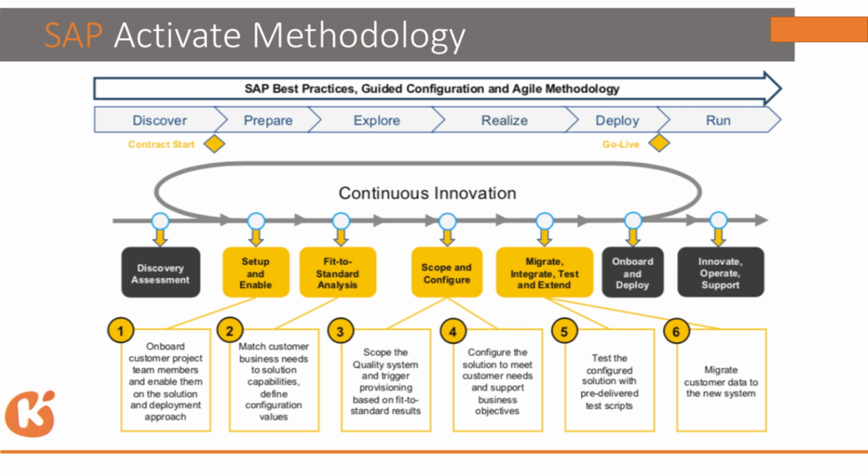The same way with drop downs, which can be anything like marital status, male or female, address type, permanent address, contact address, temporary address. If the drop down values are not appearing in the system, we will get an error saying this particular value does not exist in the system. So we need to check everything thoroughly, and only then move to production.